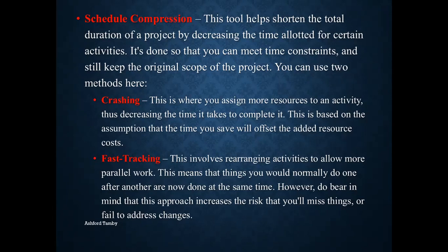let's say different activities. So during the execution process group, you have all the different persons working on the different activities. And you realize an activity might be finishing early. Although you scheduled it for 10 days, it's actually taking 6 days. And you're on the 5th day, you realize, okay, this is going to finish tomorrow. But you scheduled it for 10 days. What would the workers be doing for the next 4 days? But you realize another activity is behind schedule. It's supposed to finish on day 3, but you reach day 7 and it still hasn't finished as yet.